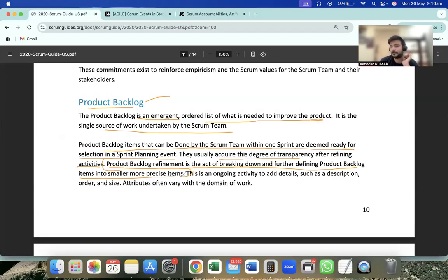So, for example, when we say that we should have an option for sign up, right? That's a product backlog item. But while we are actually on the page, we should have the UI, UX, user interface and user experience ready, and also make sure what all needs to be added in the sign up, sign in, and what all integration with the authorization, OAuth authorization. So I'm breaking it down further, refining that particular user story of sign up into more details.